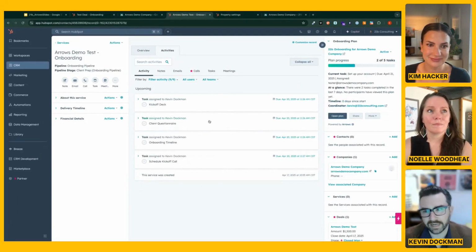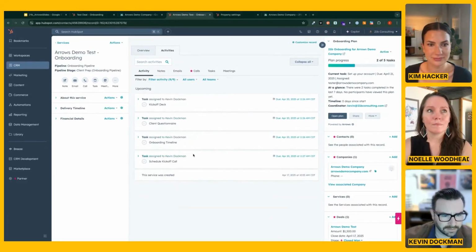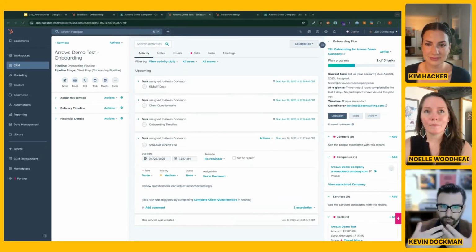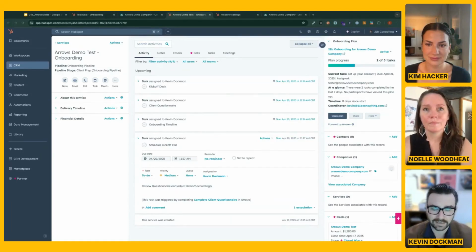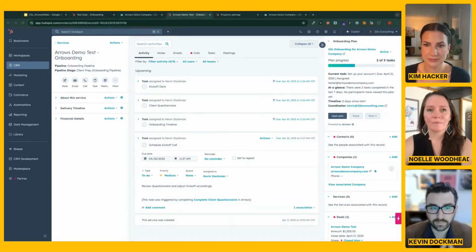I now have a new task because the client completed their questionnaire, which is to say, review and send client questionnaire. Now that they've completed the questionnaire, my task is to schedule the kickoff call. We have the information we need. We're going to update our kickoff deck and have it a week after they sign up, or whenever they are able to schedule it. And like I said, phase by phase, task by task, you're able to move things into the HubSpot space, assigning them to yourself or to other team members to ultimately complete this service.